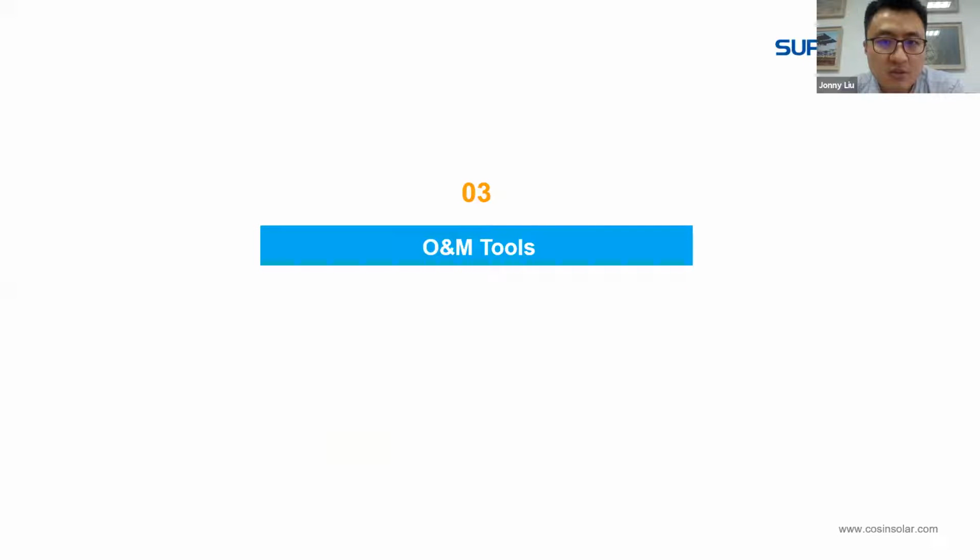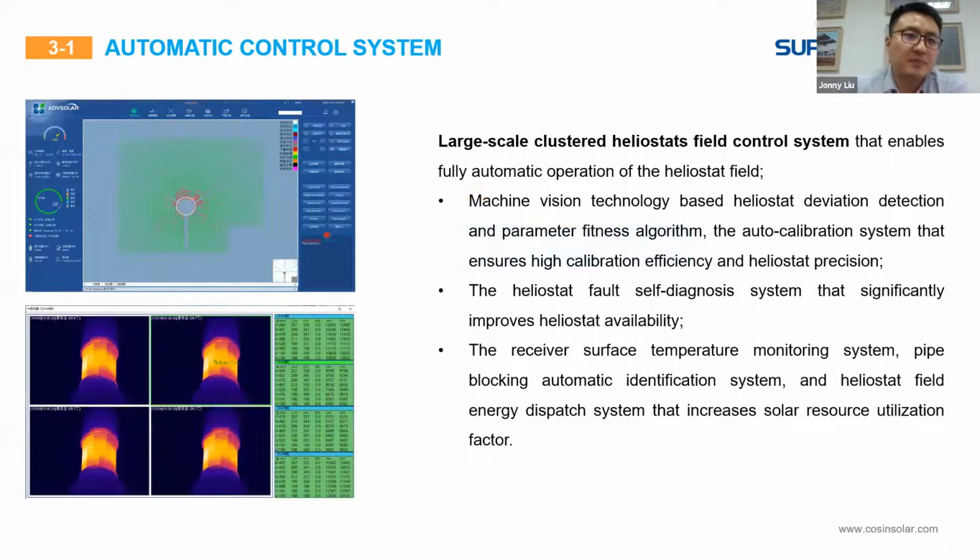The third part, I would like to share some experience about the O&M. For the Delingha 50 megawatt project, we operate by ourselves. Actually, before the COD, normally 6 months to 12 months, the operation team is there on the site to do the mobilization for this project and to set up all the procedures for the operation.